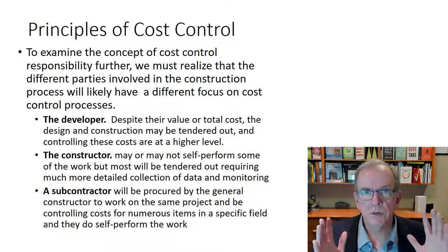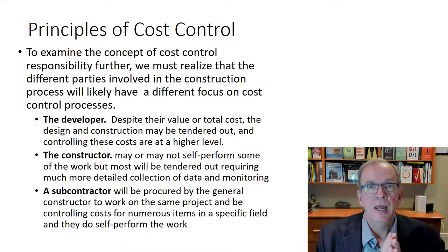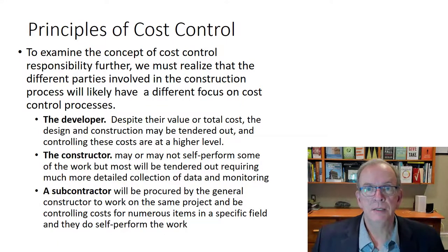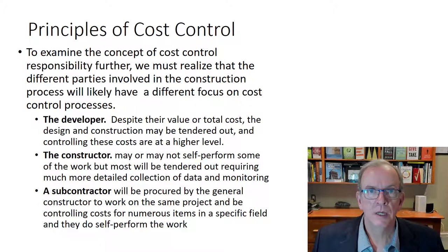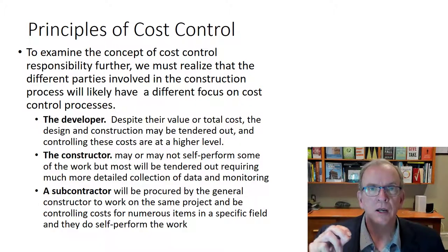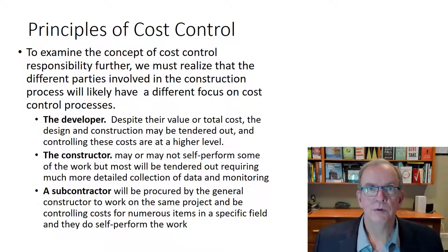They're going to be worried about the time frame that the project is going to take, because that would also affect them, especially if they're financing the project and leveraging it. That means the longer the project takes, they've got to be paying out interest during that time period. And very often construction loans are a little bit more risky to investors, so they carry a higher price premium, as opposed to mortgages on land or property, which is a little bit more stable than the construction portion.